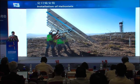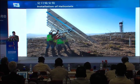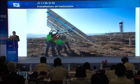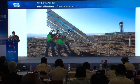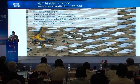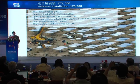If you look in the back, you'll see the tower. That was another first-of-its-kind challenge, was to lift that 339-foot steel tower and 3 2,200-ton boilers. And so it was built in parts, lifting the boiler in pieces, and we created multiple assemblies and as much construction on the ground. We're using different techniques for the next project. The lower portion of the tower on the foundation, and the upper tower pre-assembled on the ground and lifted into place. So as I mentioned already, we reached the goal, and they averaged 1 per minute during construction time.